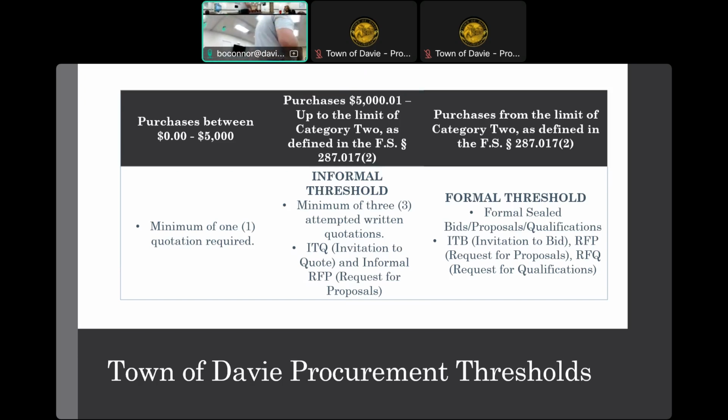Okay. Again, it's a little convoluted. Reading it sometimes can be a little difficult because there are other pieces and parts that come with it, but it's a statute that does not allow us to go out and look at pricing. So when we do solicitations for architecture and engineering services, we don't look at the price. We look at qualifications only. Then we select based on qualifications, capabilities, things of that nature, but we don't look at the price. We negotiate the price, but we've selected that firm.